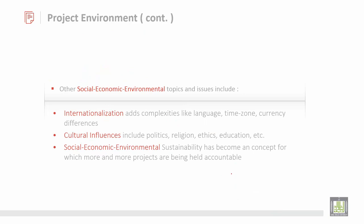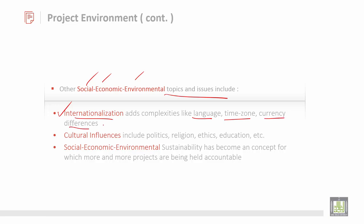The main topics and issues for the social and economic environment — first is internationalization. Internationalization adds complexities like language, time zone, currency, and differences. When you are having some international contact, you should be able to satisfy these three main factors: language issues, time zone issues, and currency issues. You should be able to compensate and make it a common one.